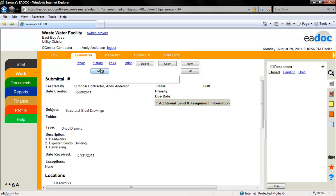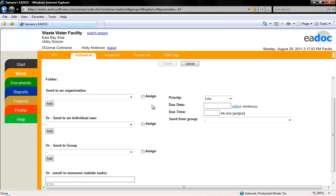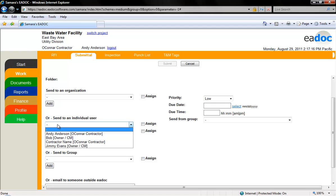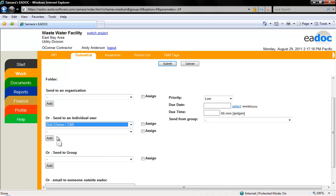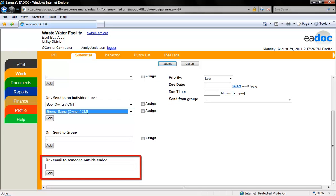To send your submittal to other users, click the submit button. A new window will open up allowing you to select which users and organizations the document should be sent to. For each user or organization, click the add button and select them from the drop-down menu. If the document needs to be sent to an individual who is not using eDoc, under the email to someone outside eDoc heading enter their email address. The document will automatically be converted to a PDF and sent to the address entered.